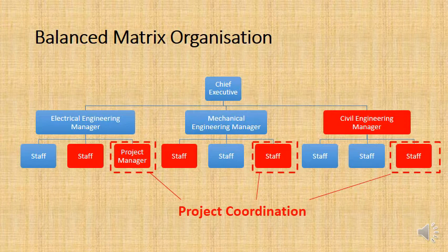Now, there are a couple of small issues with this though. First off, suddenly, if you look at the mechanical engineering staff involved in the project, they don't have a higher up, more senior manager involved in the project. Neither do the electrical engineering managers. Now, this can mean that the quality of various components, be them electrical, mechanical or civil, can diminish. But the cost and the time are better managed, and we'll see this.